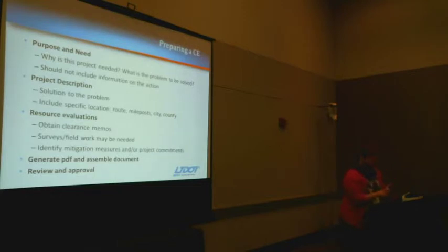And then some of that depends on weather as well. We can't do archaeological surveys when there's snow on the ground. Or you can't survey for Ute ladies' tresses, but they only bloom in like July or something, right? So that can affect your schedule as well. You can always avoid that, but you just have to know in construction, if that changes, that could change your project.